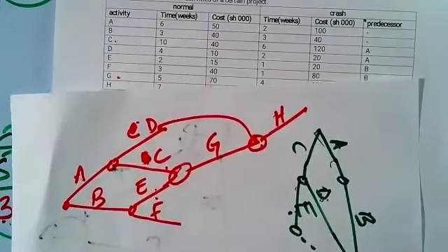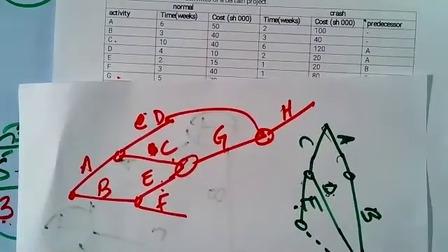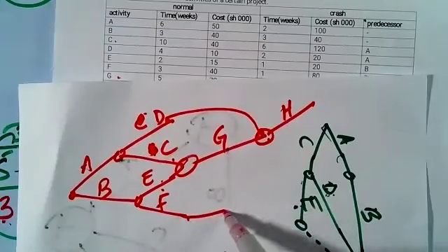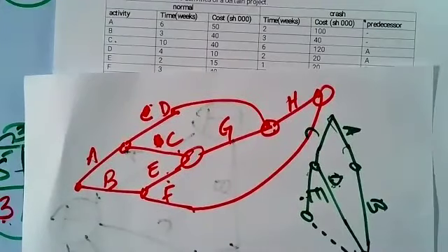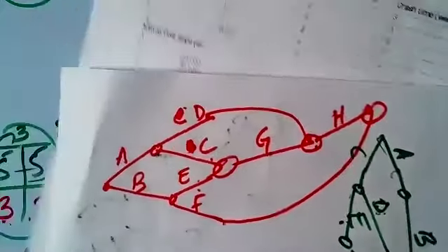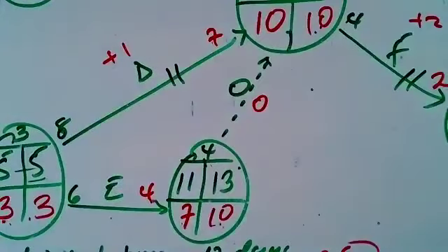Then with that, it's complete. But now H is hanging, F is hanging. You should not leave your project hanging. So what you usually do is just join F and H. They join there. So how do we draw that? We already have a sketch there. So now let's draw a fair copy.